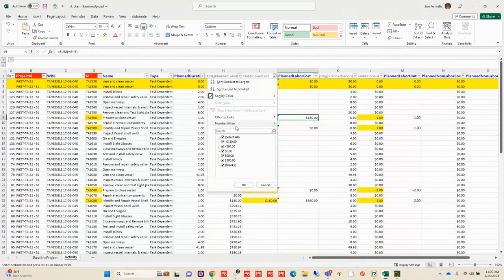extract each time. So if I do this all the time, let me get the right one here. Where's my update? Oh, project updates, right there. So I do this all the time. I'm going to extract out what is currently in my project, and then I'm going to send out this information to the people who are going to give me that update and send it back to me. So because I do this all the time, I can save this definition, basically what columns I want to bring out. Maybe I'm doing the same projects each time. I can save all that. So if I load this, I'm going to show you what that looks like.